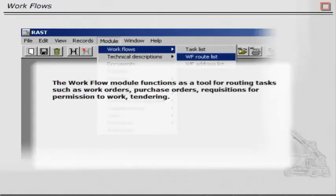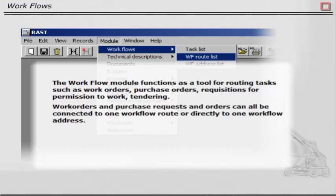The workflow module functions as a tool for routing tasks such as work orders, purchase orders, requisitions for permission to work, and tendering. Work orders and purchase requests and orders can all be connected to one workflow route or directly to one workflow address.